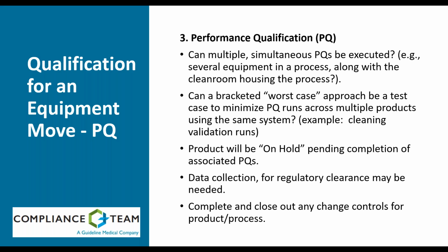When you do PQs, they are usually run on simulated, which is not as common, or actual product manufacturing situations. Remember that those manufactured products are going to be on hold pending completion of the associated PQs, meaning that you're going to have to wait till post-approval of those qualifications.